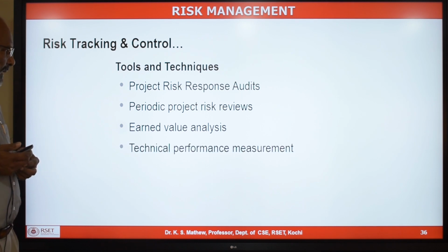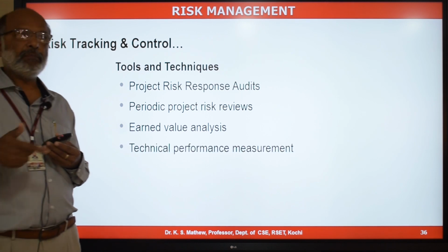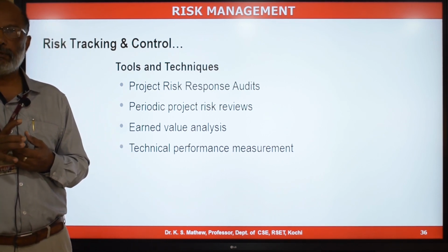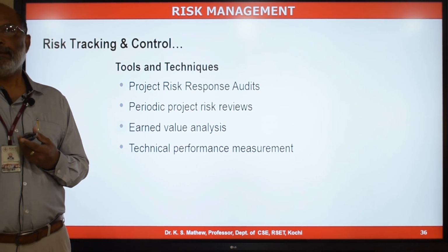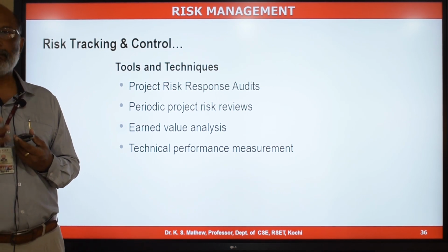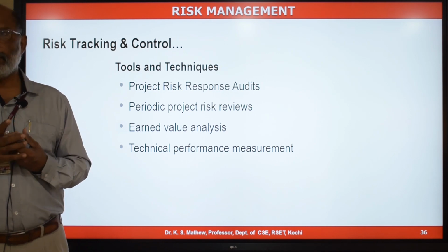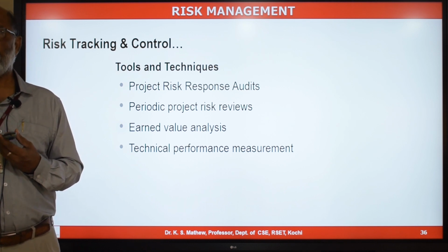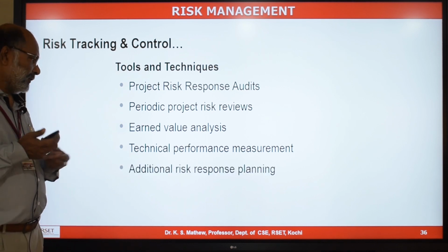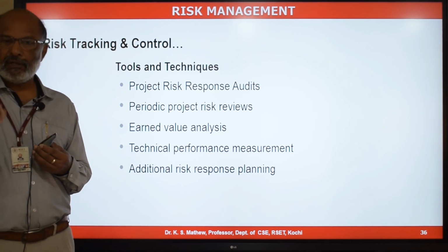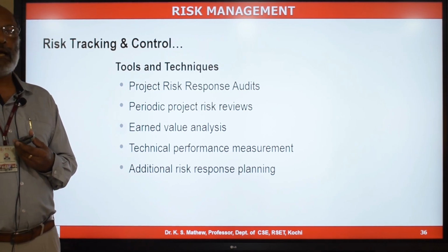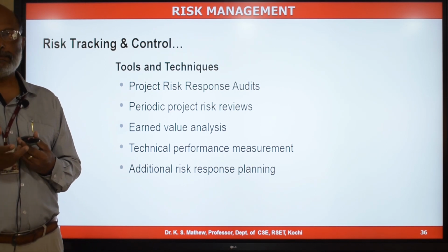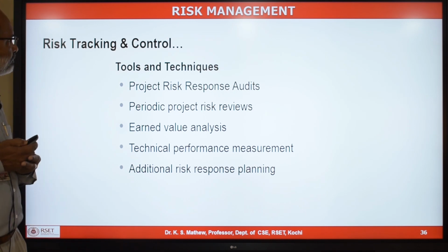So earned value analysis will also act as a tool and technique for triggering actions planned for some of the risk. Technical performance measurements. You can also do periodic technical performance measurement in terms of performance of some of the critical components of your product to see whether you are able to meet the performance requirements stated by the customer. If you see a problem in the performance, you will be able to trigger actions which was planned for mitigating that risk. And you can also plan some additional response plans during the project status and progress review. As we progress in the project which was not planned before, you can add additional plans in order to mitigate the risk in the project.